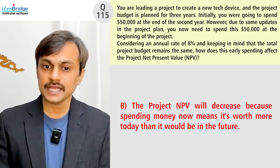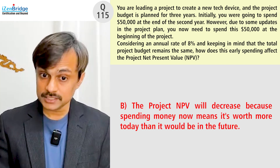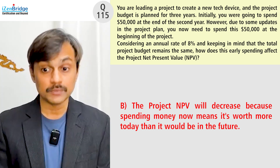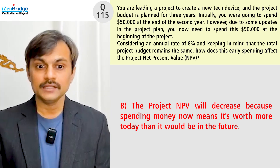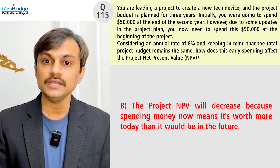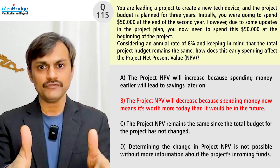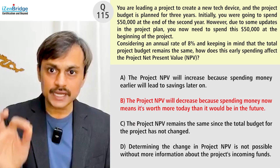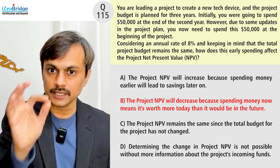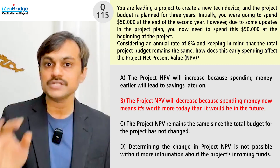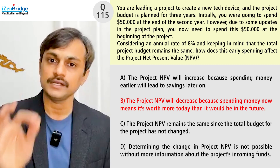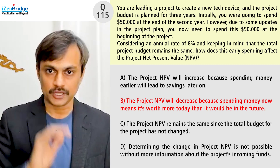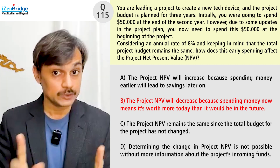Option B: the project NPV will decrease because spending money now means it's worth more today than it would be in the future. That's correct — that's option B. We need to understand that the intent of this question is to check the project manager's understanding of net present value, not the calculation.